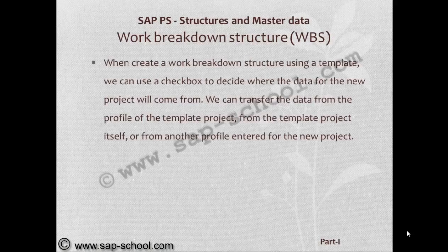When we create a work breakdown structure using a template, we can use a checkbox to decide where the data for the new project will come from. We can transfer the data from the profile of a template project, from the template project itself, or from another profile entered for the new project.